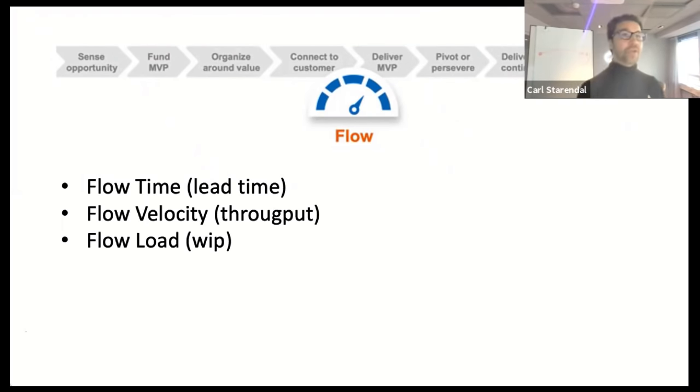How many are we currently working on? How many are we currently trying to validate in the hands of our customers, or whatever the state is? Now you have a sense of the amount of queues in the system. You can see the amount of WIP, basically. So these three don't tell you what to do. They only tell you the state of things. And the WIP can be used as a first constraint, which I'll show you in a moment.